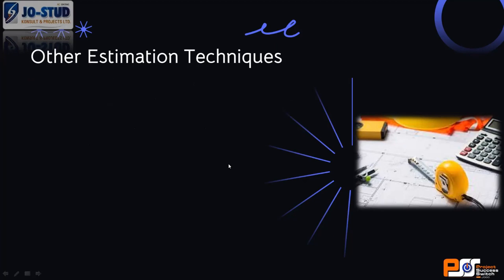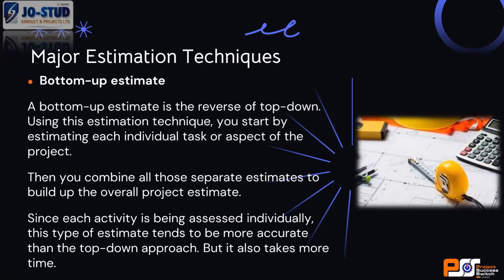Now, you use expert judgment in conjunction with your bottom up, because all these work packages I ask you to list, it's not every one of them that you should sit down and do. As you are doing your bottom up, and you have 1,000 work packages that you have to estimate in 2 weeks, you can be calling people. Now, experts does not mean somebody who went to school, an architect, engineer, or a colleague that is professional. No, expert can be a mason. Expert can be a carpenter. Expert can be that unlearned, outside booking laborer that carries load for you.